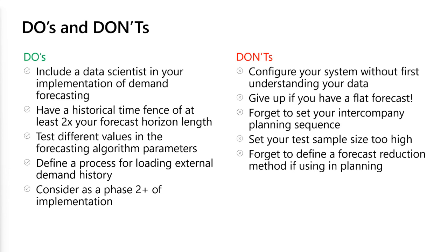For this reason, a lot of customers consider implementing demand forecasting as a phase 2 or further of their Dynamics implementation in general, so that they don't have to go through that process of figuring out how to massage the legacy data so that it's compatible with Dynamics. So that's one of our options, is to just implement Dynamics and then come back after a certain amount of time and implement forecasting just using the data we have in the system.